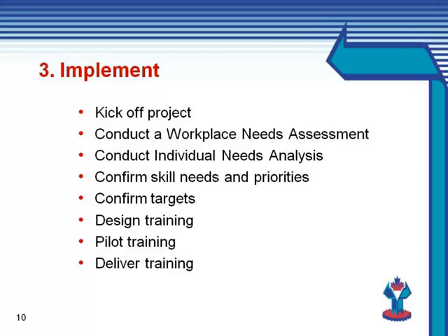It is good practice to pilot any new program. For example, a staged rollout that begins with an important piece of the Essential Skills program and a single target group allows you to use what you learn when you roll out to subsequent groups or launch the training for a different essential skill. The last step in the project's implementation phase is delivering the training.